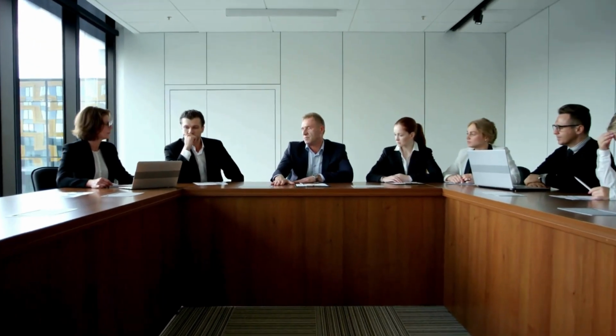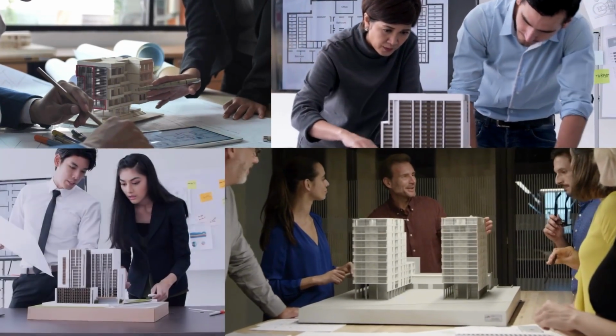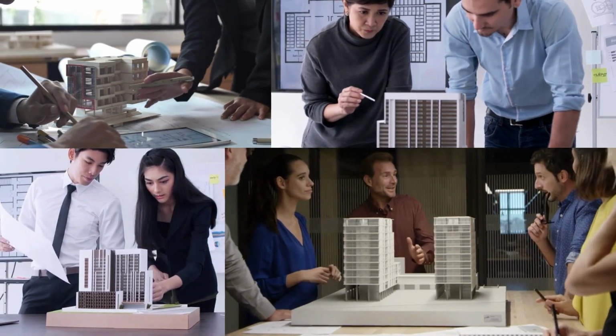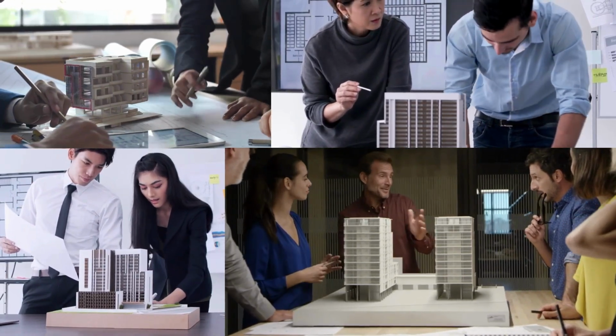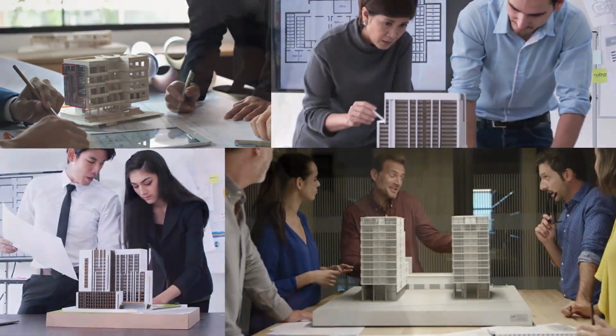This is what we actually see happen. It starts with a client setting some unrealistic finish date. They say they want the project completed in the next 12 months. They then go to market. 3 to 6 contractors quote to deliver the project. The most aggressive contractor, the one who's desperate to win the job, will say, yep, we can meet that. They reverse engineer the schedule and come up with some completely unrealistic baseline schedule. They submit this schedule, and they sign a contract saying that they'll meet the client's finish date.